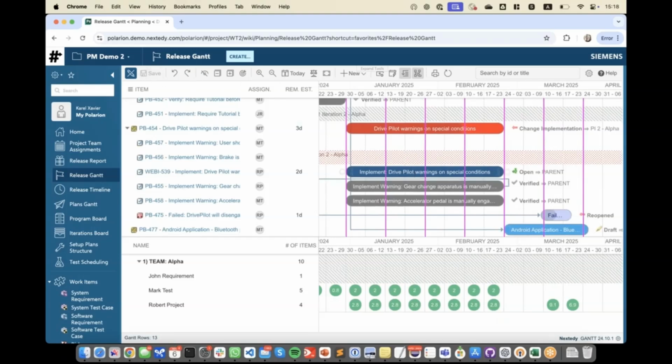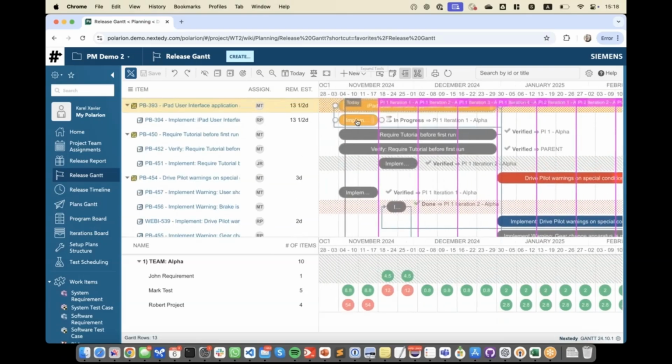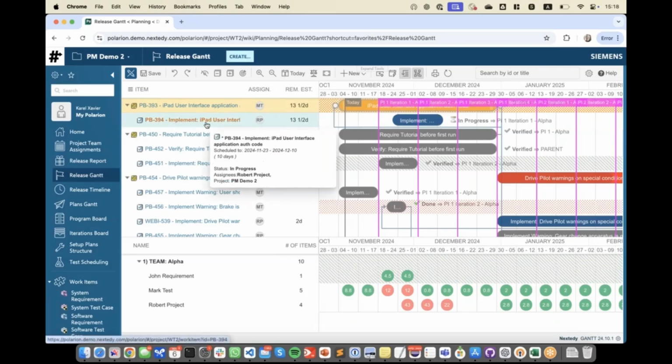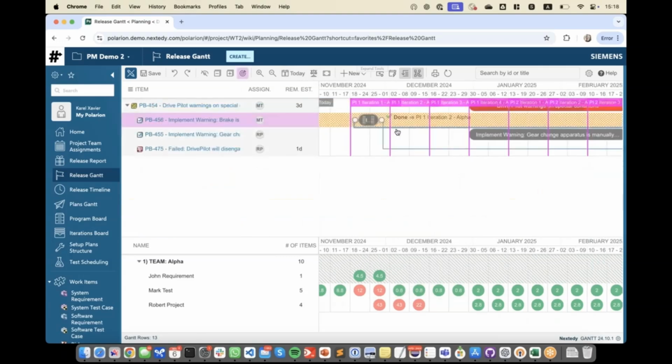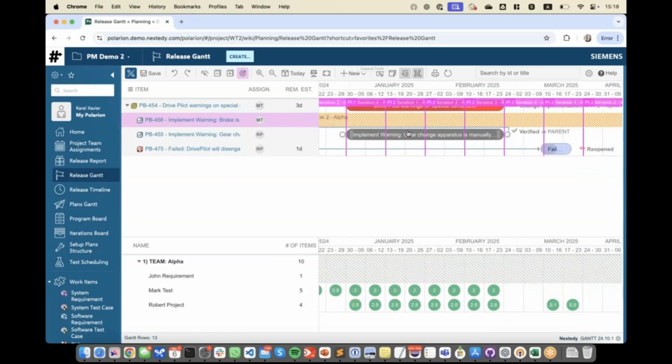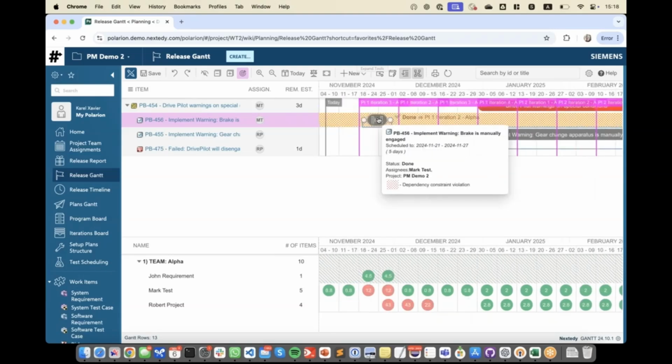Here we have a simple work package which has an unfinished task. I can just drag it on the timeline, and the system will automatically set the start date and end date as custom fields of this particular activity. I can compare it with any particular baseline. I can see that there is a notion of dependency. If I select a particular item, I see that this one has that particular item as a prerequisite, and because of that, I see it highlighted.